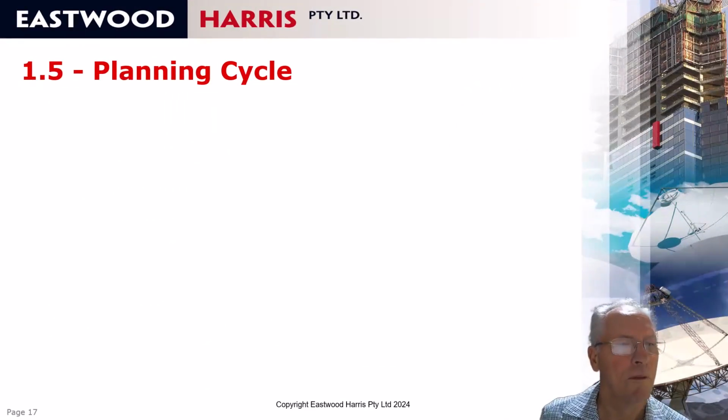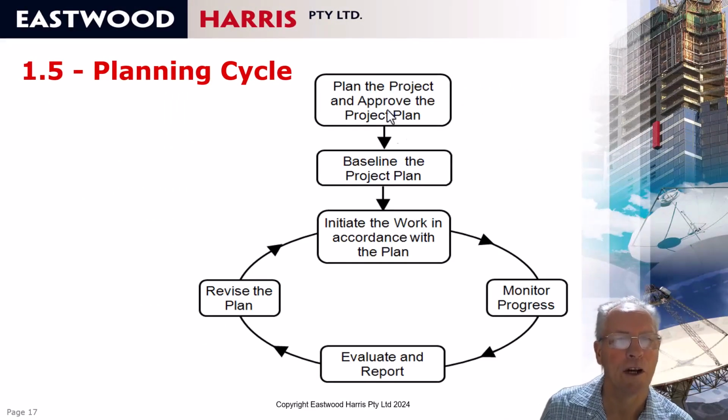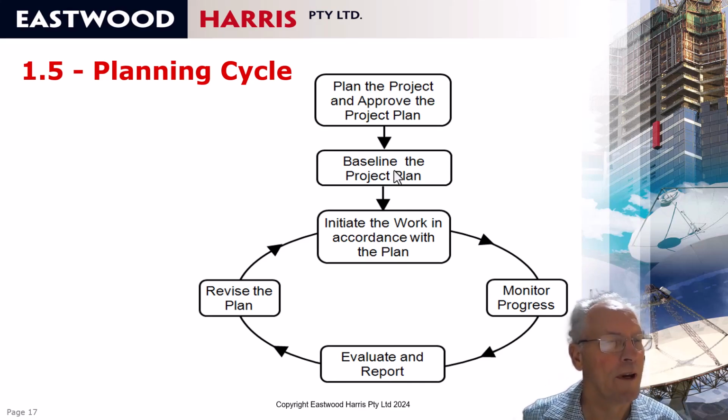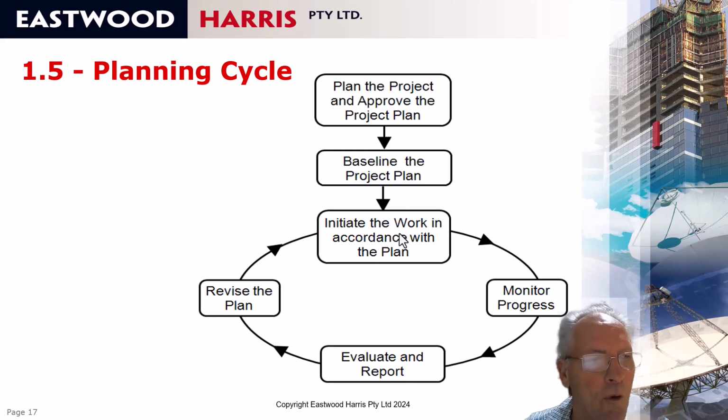Planning cycle. Most projects follow a planning cycle where the project is planned and the plan is approved. Normally you set a baseline, and the baseline is considered a copy of the project that progress is measured against, and extension of time and delays are often proved or evaluated against. You should initiate the work in accordance with the plan.